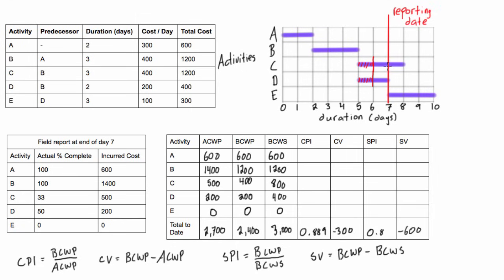A negative schedule variance indicates the project is behind schedule. You can see this visually on the Gantt chart — we expected the second and third days of activity C to be done, and all of activity D to be done, but those haven't been completed. In summary, our project is both over budget and behind schedule.